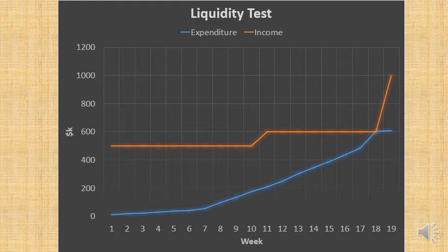Remember, at the start of the project, you have 300,000 of your own capital in the project company, and you've borrowed 200,000 from Avan. That in turn goes up by 100,000 in week 10 because you complete the design phase. And then look, basically at week 18, these lines just touch.